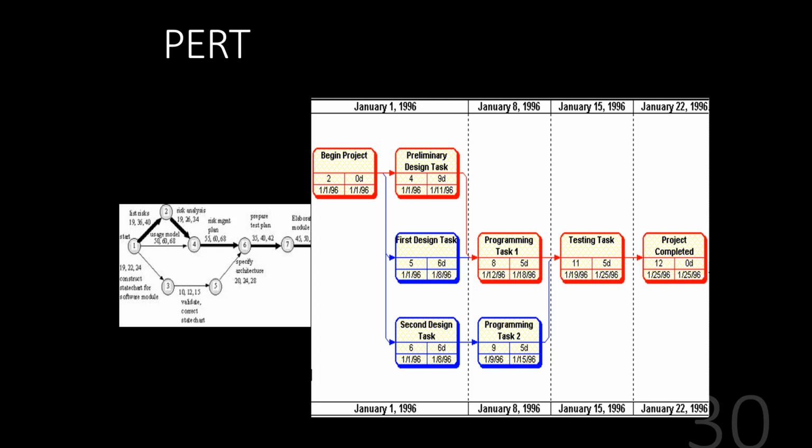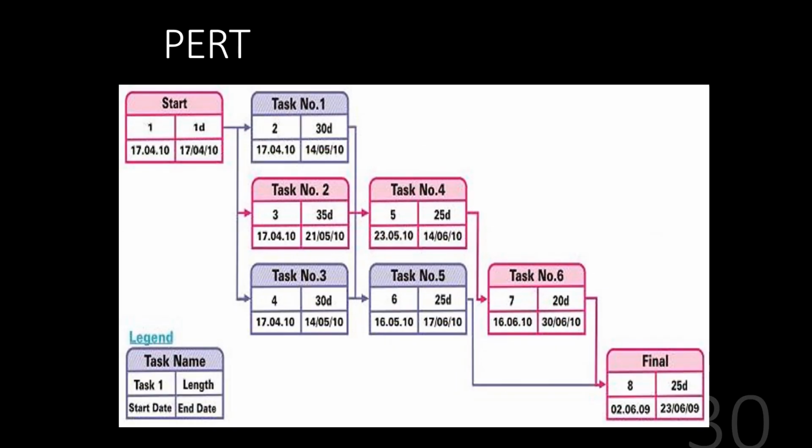And here's where you get into resource constraints. Something may take me 1 day's 8 hours worth of effort, but if I'm working on 3 things at a time, I can only provide 2 hours of effort to that one thing per day. So it may take me 4 days to actually complete it. So the actual effort required versus the target dates comes into play there. And that also brings into play how many resources you might need to put on the project. So this is a Pert chart.